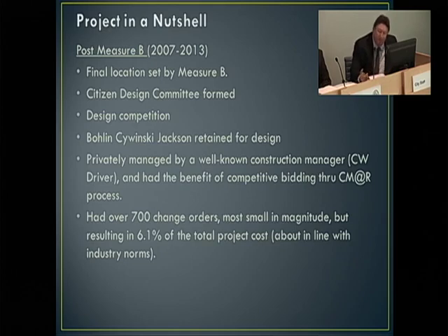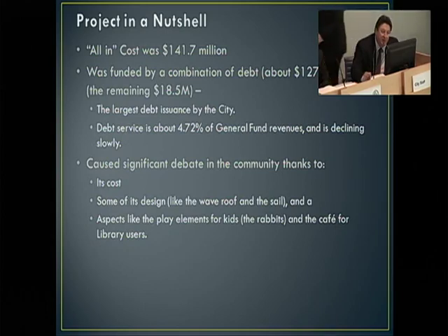But the project did move forward, and of course, obviously we're here. It did have a number of small change orders, about 700 in number, which represented about 6.1% of the total cost, which is in line with industry norms. The all-in cost, including the design, the furniture, and all the other pertinent items, was $141.7 million.